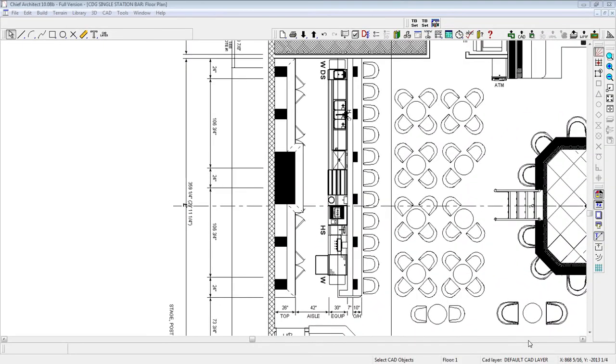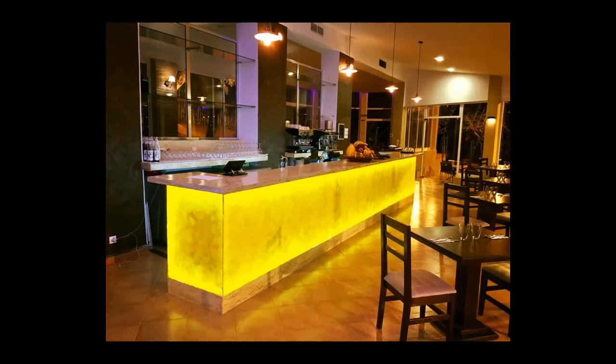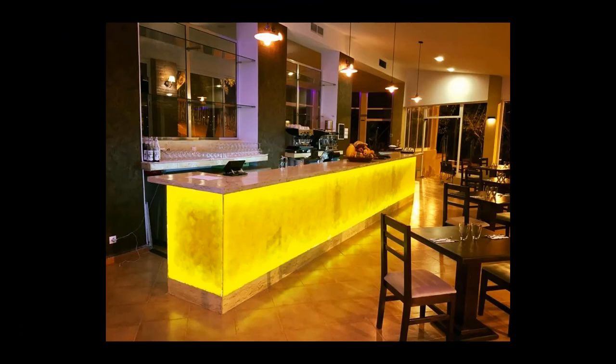A good budget to construct a basic bar that encompasses all of the above is $2,000 per lineal foot. This includes 10% for contingency, which is a necessary fund to include in every construction project. This budget would also include a granite bar top and a moderately priced material to finish the bar facing, such as the one shown in this photo.